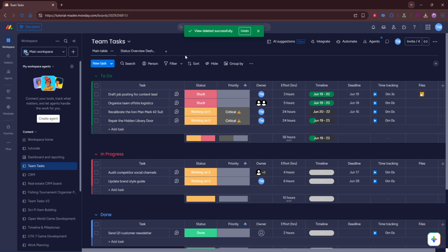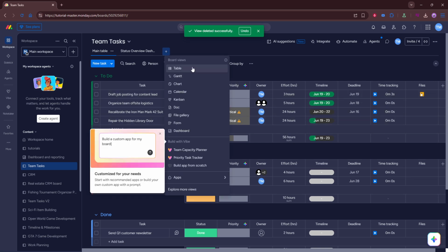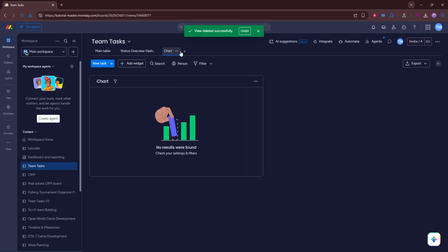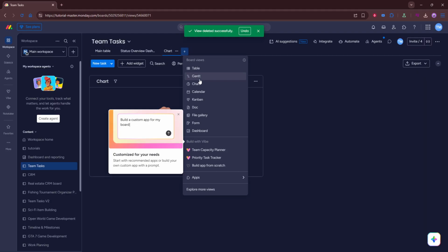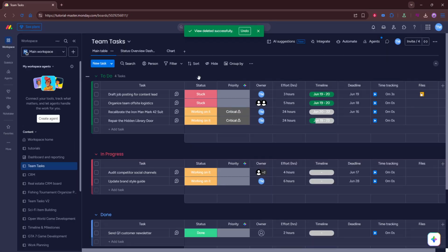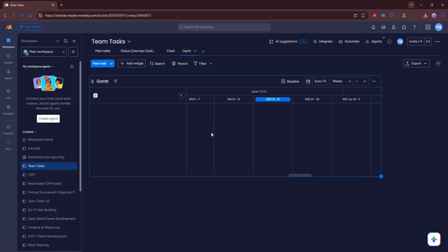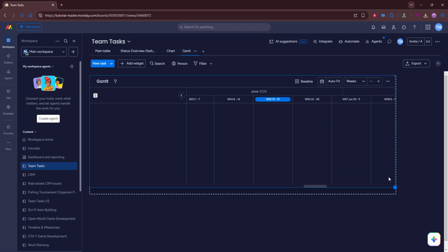If some of your tasks are connected and one task depends on another being completed first, this is also a good time to add dependencies. Dependencies are important because they help the Gantt view reflect how your project actually flows. For example, if one task cannot begin until another task is finished, linking them creates a more realistic timeline and makes future scheduling changes easier to manage.